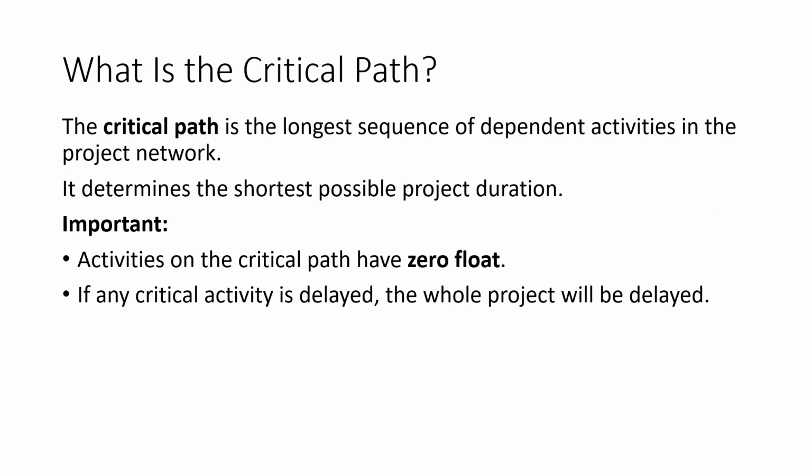What is the critical path? The critical path is the longest sequence of dependent activities in the project network. It determines the shortest possible duration of the project. Even though we call it the longest path, it actually tells us the minimum time we need to complete the project.